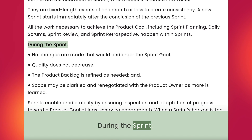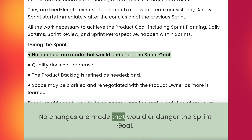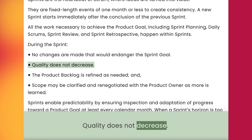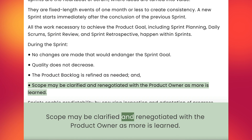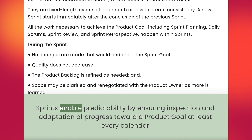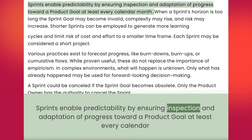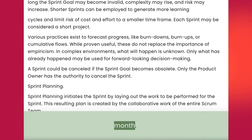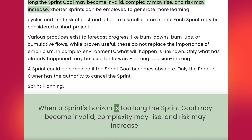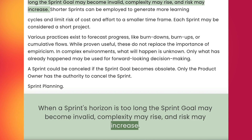During the sprint: no changes are made that would endanger the sprint goal; quality does not decrease; the product backlog is refined as needed; and scope may be clarified and renegotiated with the product owner as more is learned. Sprints enable predictability by ensuring inspection and adaptation of progress toward a product goal at least every calendar month. When a sprint's horizon is too long, the sprint goal may become invalid, complexity may rise, and risk may increase.